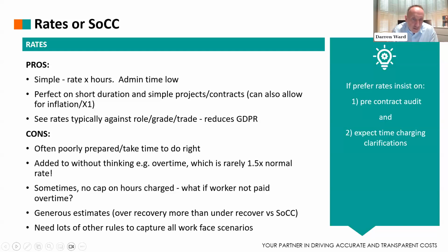That is rarely correct, because in his £30 an hour, there will be costs in there that simply don't increase by that 50% factor. There might be things in like car allowance, health benefits. There could be pension. Not all overtime is pensionable. So what you often see is the true cost of an overtime rate is something less. If I was a betting man, £30 an hour for normal pay, if that person was to work half an hour of overtime at 50%, I would imagine the overtime rate works out at £32, £33 an hour, not 45.